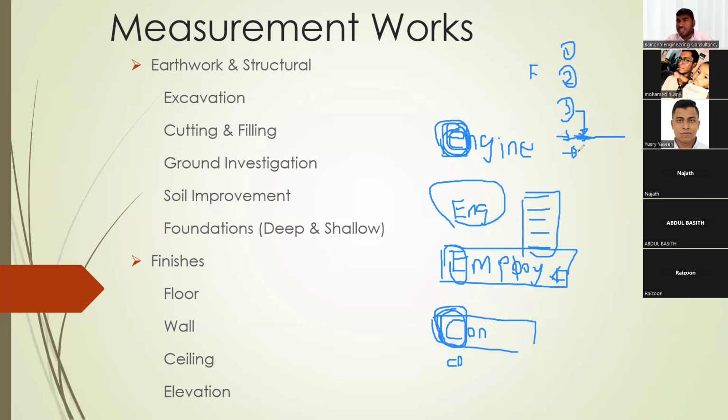There are other contractors called domestic contractors. You have to understand this term, domestic contractors. This means the main contractor, the one we talk about as capital C Contractor, appoints his subcontractor. He is not a nominated contractor. The main contractor appoints his subcontractors. Those people are called domestic subcontractors. In FIDIC, they don't call them domestic subcontractors, they just call them subcontractors. So these subcontractors are under the main contract. Nominated subcontractors are nominated by the client, but they also have a contract with the main contractor. So don't get confused with that. Just be familiar with the terminologies.